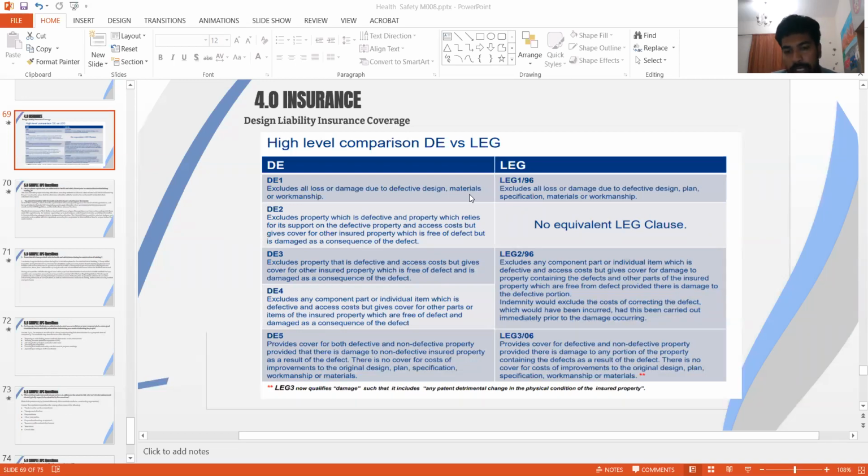Simply, the CAR policy excludes the equipment and they will reject the claim, and for the tower crane, they will pay up to the limit for contractor equipment and machinery, which is the smaller limit. So the best practice is always to obtain contractor equipment also as a part of the CAR policy, even for the small amount, which is the plant and equipment active at site. Make sure you bring everything under one insurance company and one umbrella. This way you can avoid such a case.